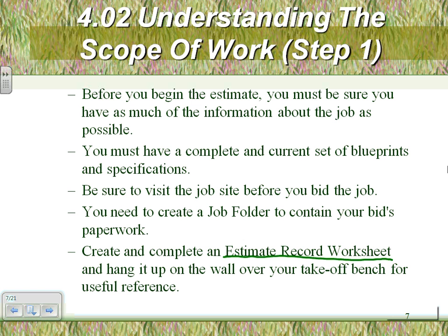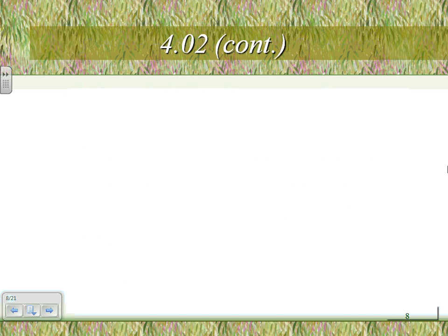If you guys look at the 49, it tells you estimate record worksheet, job information, the job name, location, owner, bid due date, important, city, phone, plans and specification details, date of the plans, blueprint number, comments if any, jerk engineer for example, contractor information details, the contractor, the address. Look at the complete information about the contractor, important contacts, the architect, the engineers, the utilities, the inspector, and a couple of notes for you. Common sense. Every project, before you start taking out fill, my friend, you have to fill a page like this, right? Common sense, right? Get all the information in one piece of paper before you do the takeoff.